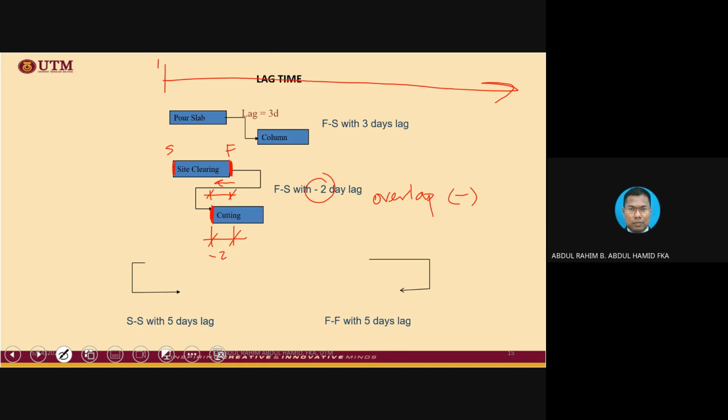Okay, if it is positive, meaning to say it is being delayed 3 days after the finishing of such activity. So the reference point is basically you must read this -2 with respect to the finishing. Okay, so it is ahead by how many days, whatever the dimension that you use.